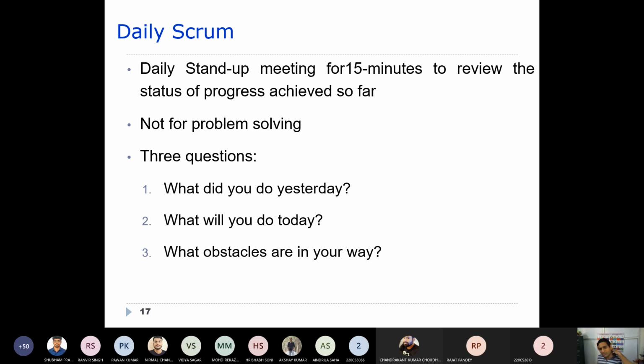It is not a problem solving meeting. We are not trying to solve problems through this sort of meeting. Rather, it's a meeting to find the progress. Usually three different questions are asked. What did you do yesterday? What will you do today? And what obstacles are in your way?